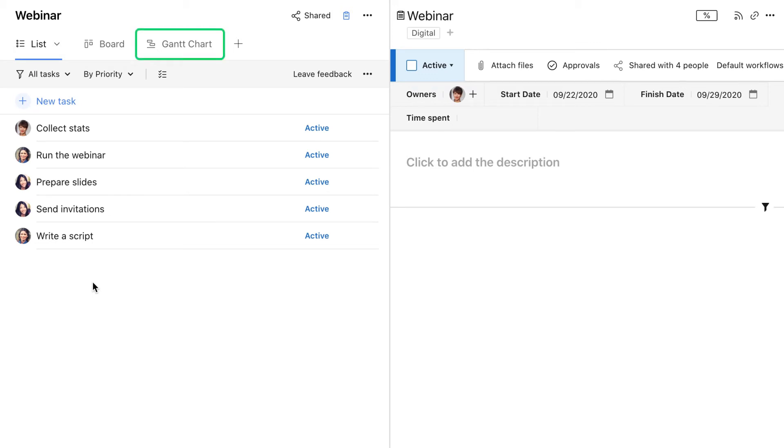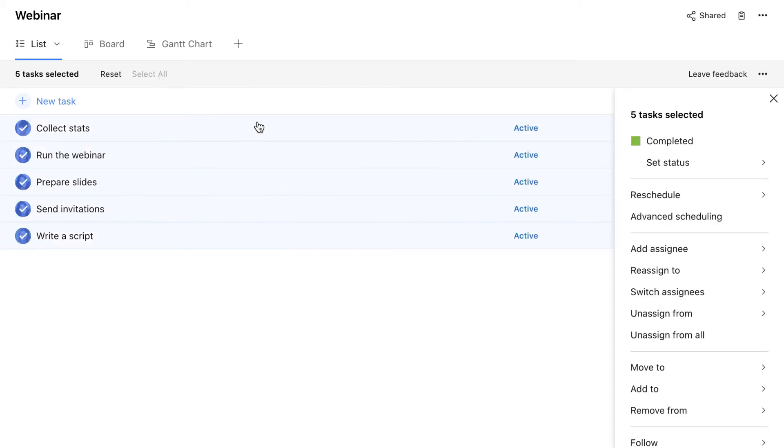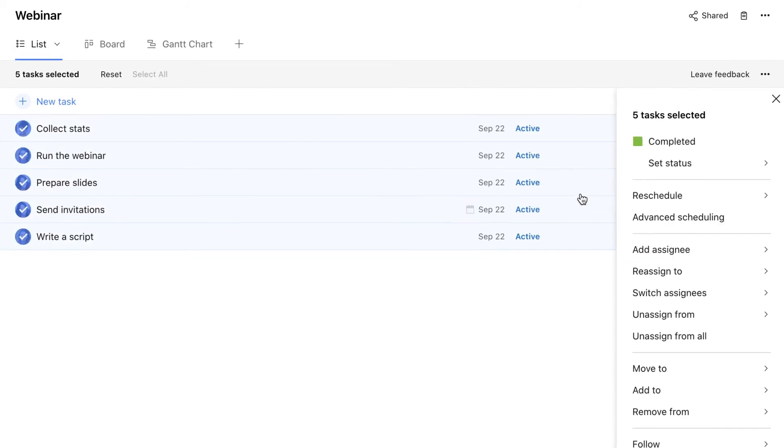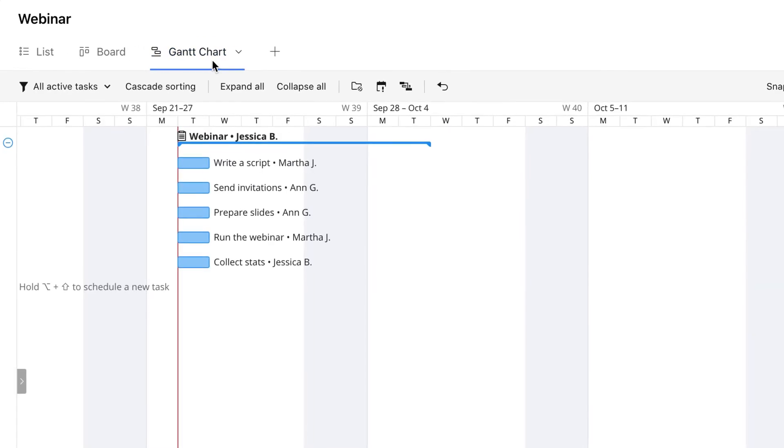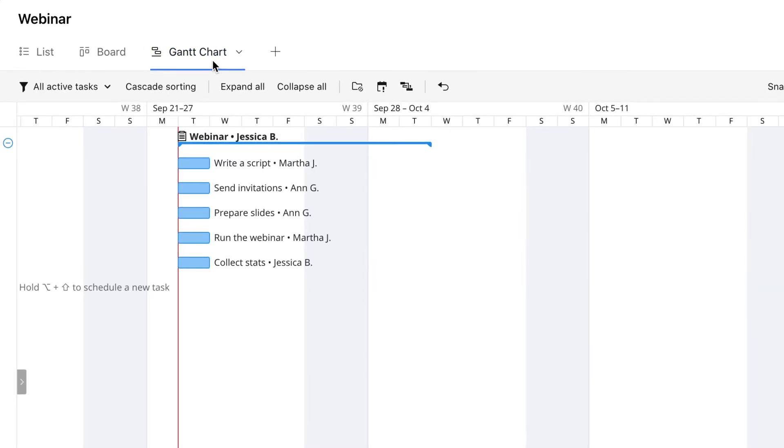The Gantt chart view is one of the best views to use to allocate your tasks in time. For tasks to appear there, they need to be scheduled, so I'm using mass actions to quickly schedule them for today. Now that we can see all the tasks on the Gantt chart, we can easily set their duration.